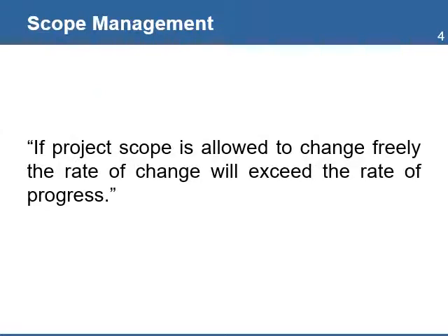One of the main causes for project failure is the poor management of project scope. This usually occurs when there is not a good definition of the project scope, no agreement with the stakeholders on the scope of the project, and the lack of a good scope management process that can avoid inclusion of unauthorized work to the project. This is also known as scope creep.